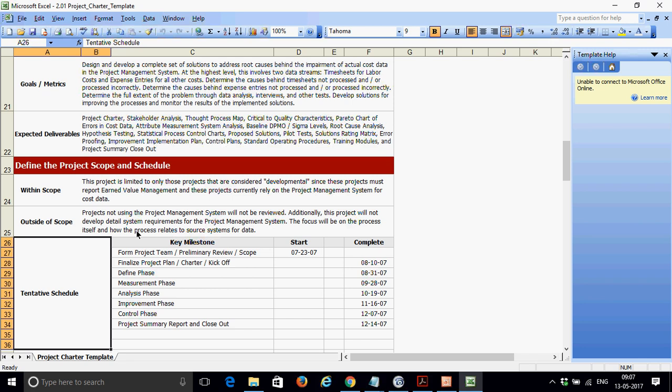What will be the tentative schedule? When I say tentative schedule, this is not something you get out of the project management plan. At a high level, they're expecting this project to start in the first week of May, and to be completed within 1 year because they have budget for only 1 year. Sometimes they don't have information on when the define phase or analysis phase needs to be completed.